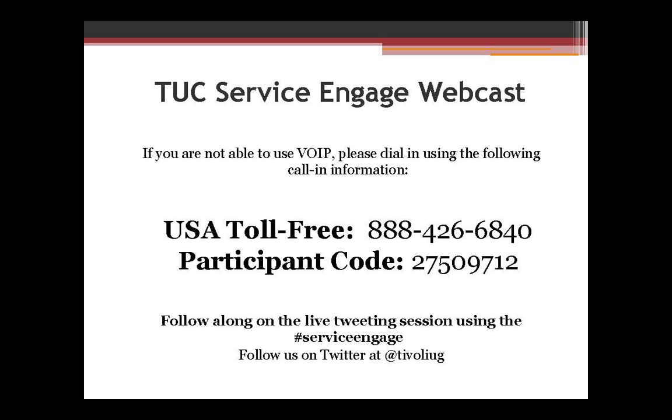So it's interesting how we've decided to roll with translation when we're deploying 20 times a day. Since the translation process can take quite a bit of time because you have to get the files translated, make sure that it's right, and then promote it, what we're doing is getting the translated files and stopping ship about once a month and calling that its own separate deployment. So in the end we'll have two separate apps running, one that's translated and one that's English. The English site will be the newest and latest and greatest. And then about once a month, the translated site will get bumped up and be, at that point, the latest and greatest. So they'll be moving in two streams, with the translated site getting bumped up every now and again.